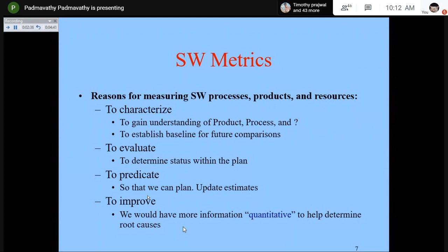Similarly, you find out why the project is moving slow compared to the plan. For example, you have planned to complete the project in 4 weeks. You are supposed to complete the programming in the 3rd week, but the programming has started only in the 4th week. So what is the root cause? The programmers have not received the design. So the design team has been slower. So you have to find out what is the problem with the design team. Whether the person was absent, or the number of people in the team is not enough, or they do not have enough skills to draw the notations.